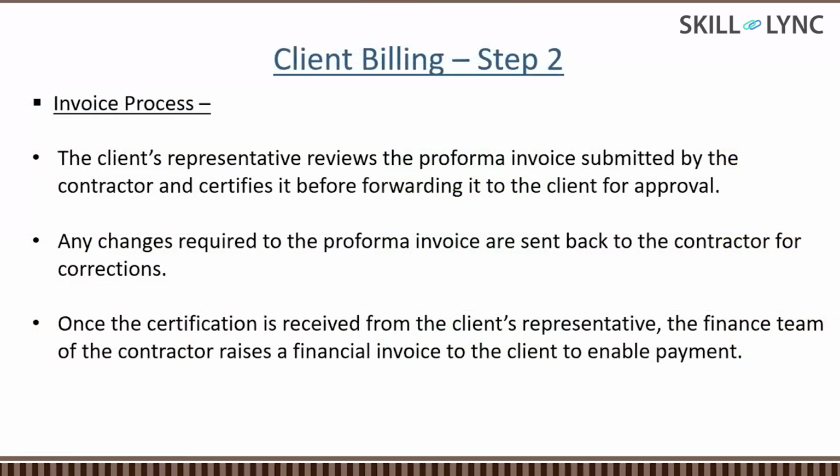Once the billing engineer has prepared this entire BOQ, they will make one proforma invoice. In that proforma invoice, they'll mention all the details: previous bill detail, this bill detail, then the total cumulative amount, how much amount has been given. That will be checked by the project accountant and project manager, and this will be given to the client. Then the client will check it. They will take time. Generally, at the end of the month, the billing engineer will start preparing the bill. He will take around 3 to 5 days.